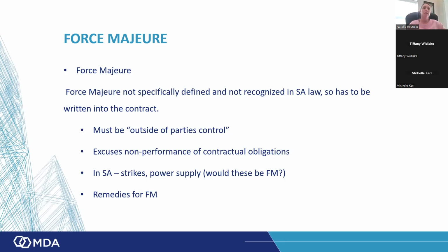So for example, the JBCC defines force majeure, but where is it? It's in the clause that says you only get an extension of time and no costs. Doesn't help anybody, poor contractors. They were like, how do we claim? How do we claim? I'm like, well, you can't, there is no ability in the contract for you to claim your costs due to a force majeure event. So I think that's also why people started becoming a bit more aware of this clause, because it did have a severe impact. I think a lot of the employers were sympathetic with their contractors and agreed to pay them a small standing time amount just to make sure they could pay their staff, for example. But it's not a contractual obligation.